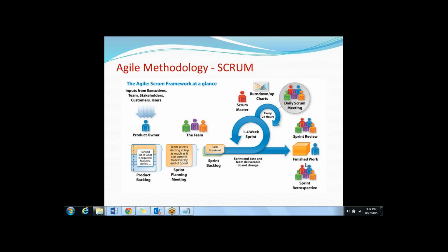But if he says that hey, in this current scenario, I did not like the design of the login page. Why don't you make the characters a little bit more bold, or change the location of the input username text box from right to left, like that? The Chase Bank client can give feedback. Once he gives a feedback, the feedback is one more requirement, and it is added as a new user story. In the next sprint, which is going to happen for the next 2 weeks, you will take that user story or the feedback, whatever the client has given, and you will work on it.